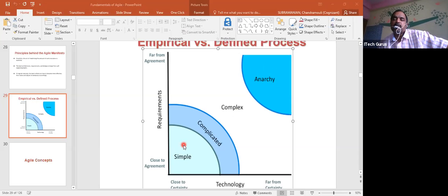So what I'm trying to tell you is that not all projects are candidates for Agile. Nowadays, you know what happens? The customer gives the requirement, in the RFP itself, saying that I want to execute the project using Agile. Because our customer knows the value. But without understanding it, sometimes a very simple project is given as Agile. That also leads to failure. Sometimes a highly complex project is also given as Agile. That also leads to failure. So you need to understand and choose the right candidate for Agile projects. Just because the customer is asking for a project to be executed using Agile, if we execute it on the wrong candidate, Agile will fail. Nowadays, a lot of projects are failing in Agile because of this problem, the wrong candidate. Is it clear, all of you? So choosing the right methodology is very important. Agile is not a solution for all your problems.